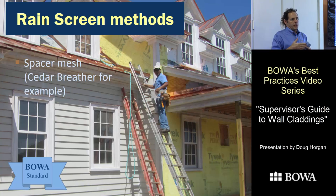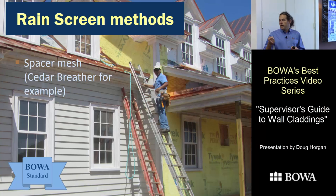And then this is a version that's made for using behind stucco and stone. It has a fabric on it so the mortar can't get into the mesh. So we're using a lot of this. With the mesh on it, it costs about $1.50 a square foot installed. If you buy the version without the mesh, which you use for siding, it's a little bit less.